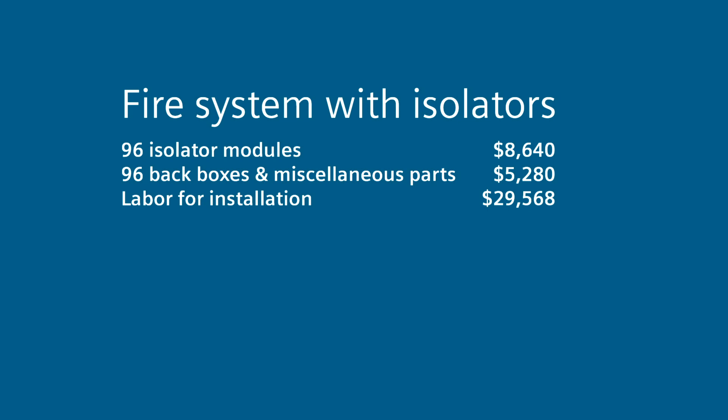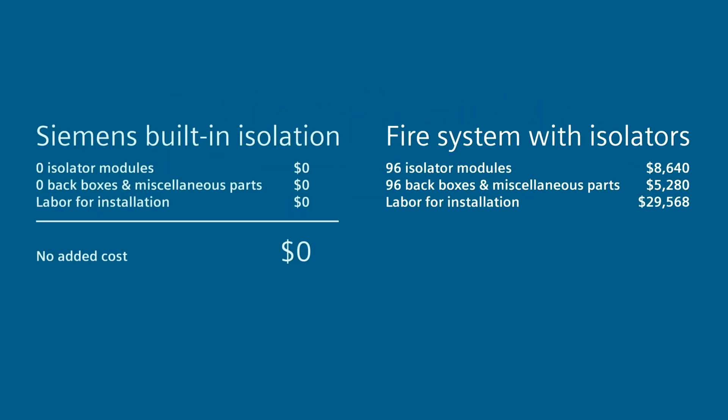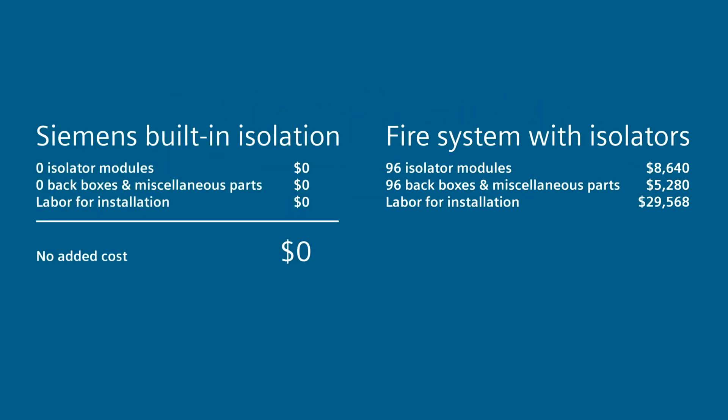And when it comes to labor for installation of the additional isolators, electrical back boxes, conduit and wiring, plus programming labor, with Siemens ISO technology, there is no additional cost compared to over $29,000 for the competitive fire system with isolators.